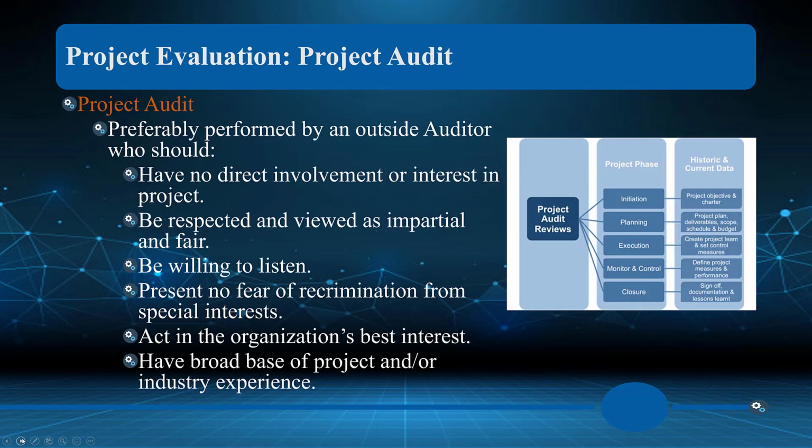When you do the audit on the project, the auditor should have no direct involvement in or interest in the project, so we need to find an auditor of some sort. We may even consult someone who specializes in coming in and doing audits. Somebody respected, viewed as impartial and fair, willing to listen to what they have to say and willing to listen as an auditor. They present no fear or recrimination from special interests, because again, they don't have skin in the game, right?